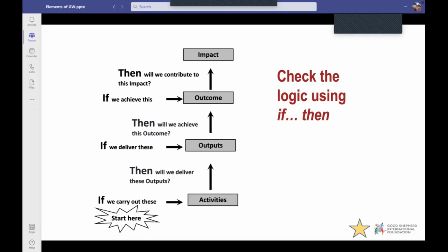And sometimes this whole process, in terms of your activities and your outputs, may take 5 years to do. It may not be within the year. So when you are writing to donor agencies, it is so important that you know the project and you know that this first year, this is what we will do. The second year, this is what we will do. The third year, this is what we will do. And then when you put all 3 years together or all 5 years together, this is the entire program or project that you are looking at. And then you ask for the money from the grant to do year by year.